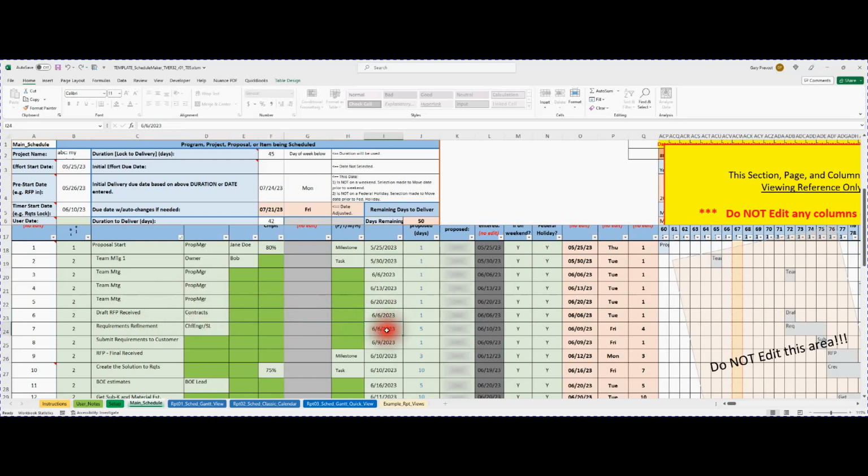So let's say you want to have this date. You can say equals that date, minus my proposed duration. Don't ever use the actual duration, because then it'll be a circular reference. So you want to have something done before. It'll back it up and complete that activity. So that would be a start-to-end relationship. It will end that date before the previous one starts.